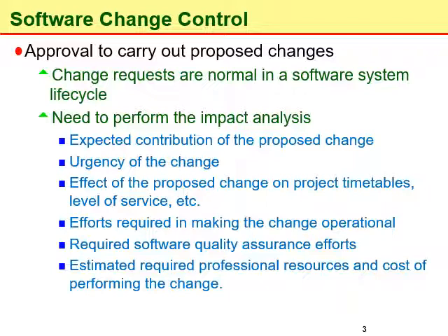In order to coordinate the efforts invested and guarantee that the changes follow project or customer priorities, an authorized body must analyze the request at an appropriate level and then make the necessary decisions regarding accepting that change proposal or rejecting it. This process is called impact analysis.